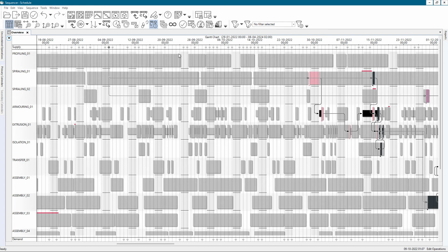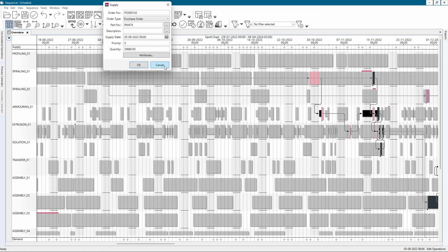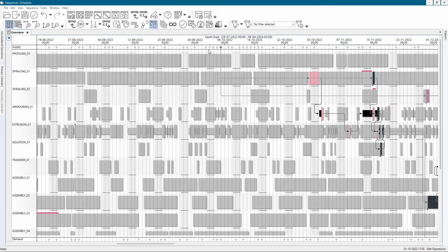And the difference between the highlight subsequent operations and highlight all subsequent operations is that all subsequent operations will include all operations. So this is useful because now you know that this particular PO is impacting a production order at this date in here. So any delay between here and here is not going to generate any meaningful negative impact in your schedule. So let's say that your supplier calls and asks you for a 1 month delay. So you come here and now you see that you're still delivering on time.